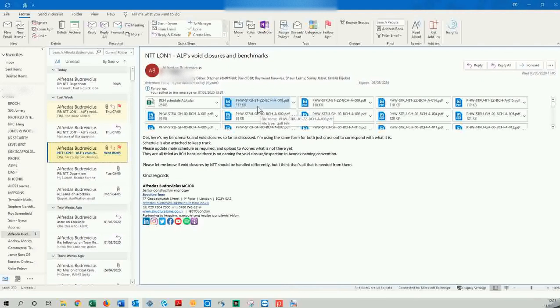That's the essence of having an EDMS system, because even if the person leaves, we have it captured on the system. So as you guys would know, on projects, people come and people go. There's a lot of turnover when it comes to human resources. And so even if they leave, the work and the documents stay on the EDMS and we can always retrieve them, as against having emails or people being able to delete them.